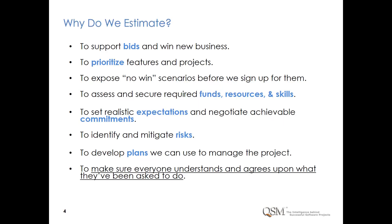The first step in creating defensible estimates is to recognize why we perform estimates, as estimation purpose drives the estimation approach. We may want to support a bid and win new business, prioritize the backlog of project features, assess and secure required funds, resources, and skills. We also want to set realistic expectations and negotiate achievable commitments, identify and mitigate risks, and then develop a plan. The plan is last.